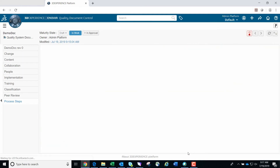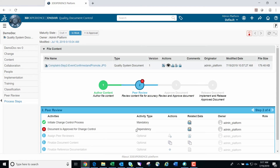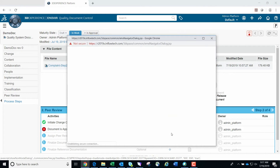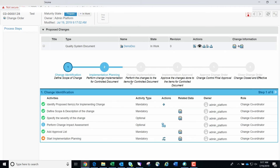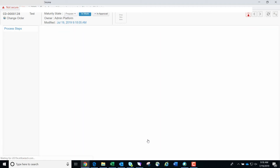You'll be taken back to the process steps page where you'll need to approve the CO. Click the CO or change order icon under the related data. The CO will open in a new screen with its own process steps. Many items are already green since we entered all the information when we created the CO. You also have the option to perform a change impact assessment if needed. We will click the promote icon in the actions menu to move the CO to the in-work stage of the lifecycle.